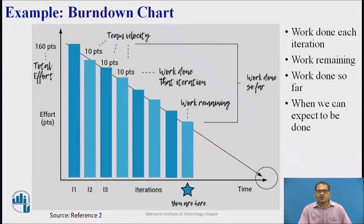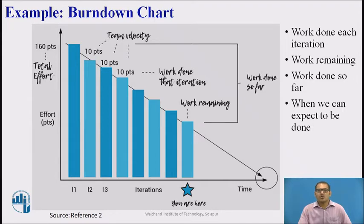This graph also provides the following information: work completed during each iteration, work still needed to be done, and the timeframe when the team expects the project to complete. While this chart is very clear and easy to follow, it is not necessarily realistic. A true Burndown Chart will not have straight lines because the team will never complete their tasks at the same speed or in the same timeframe.